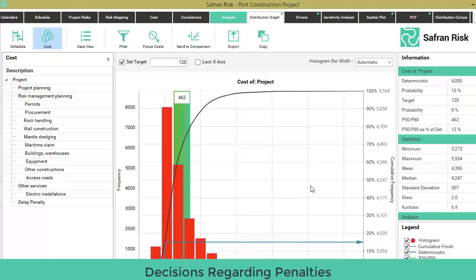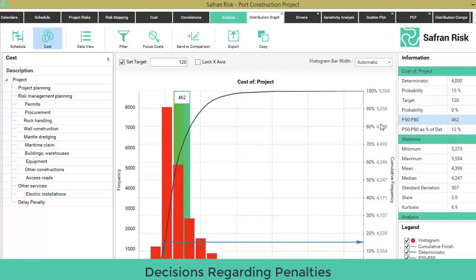Right after the simulation is over, go to the Cost of Project Distribution Graph. The statistics information table on the right side tells you the deterministic current total project cost is $4.0 billion, but there's only a 15% probability of achieving such a target. You would need $468 million — a 12% increase over the $4 billion — in order to achieve P80, the accepted convention for contingency estimation in this example.